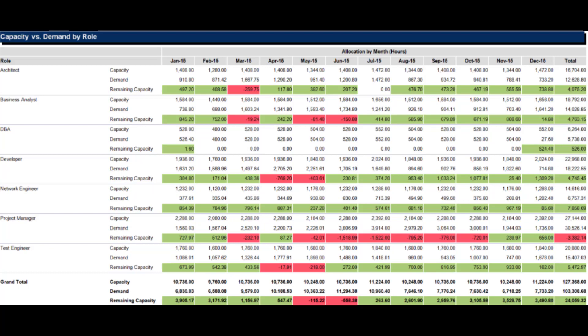The Capacity versus Demand by Role report shows capacity and demand throughout the organization aggregated by role. You can limit this output by department, contractors or employees, and more. It is easy to identify roles that are over or under allocated in this view.